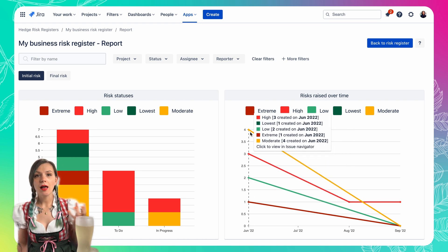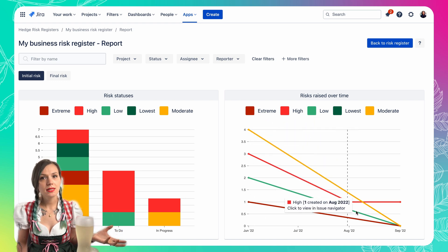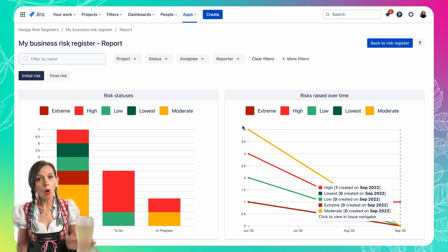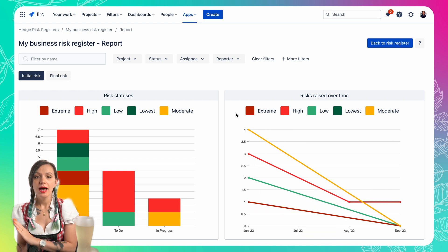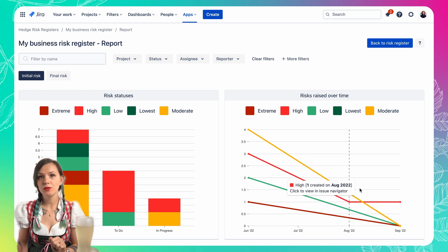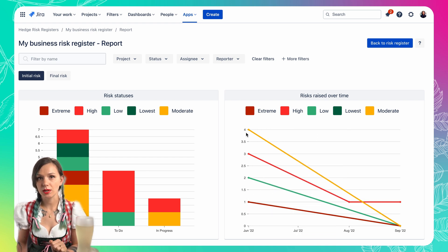Typically in healthy teams, you would see risks being raised during the whole project, and likely with a spike at the beginning of the project where you're doing the planning.